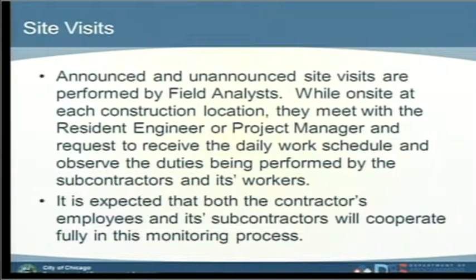Site visits. There are announced and unannounced site visits performed by our field analysts from the compliance unit. While on-site at the construction location, the field analyst will meet with the resident engineer or the project manager and request the daily work schedule, and he will observe discreetly.